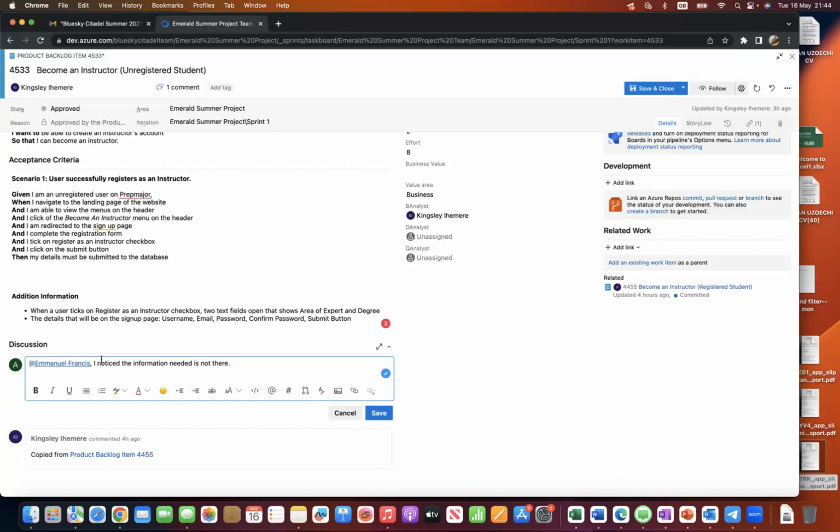As a Scrum Master, in my opinion, check to make sure all the tasks on a particular story have been moved to done before I take that story to done. If you take that story to done and there is a task card on it which is in progress or in to do, you are not sure if that thing has actually been done or not.